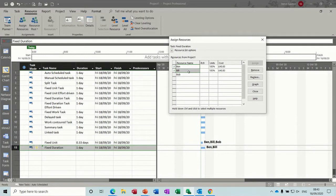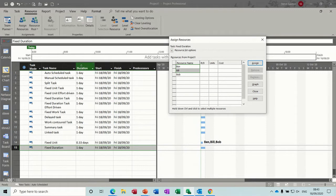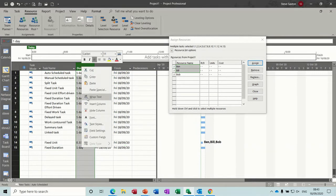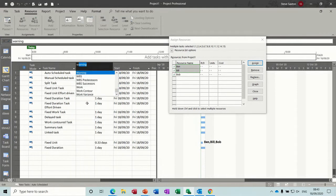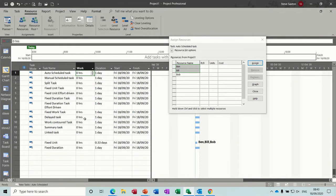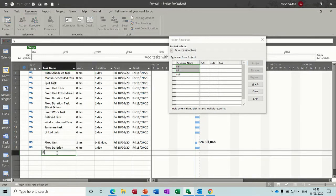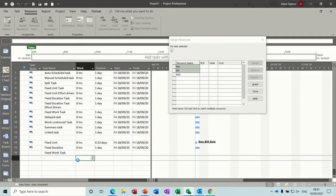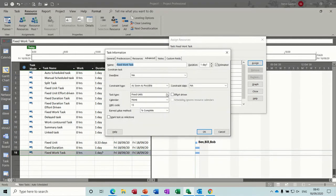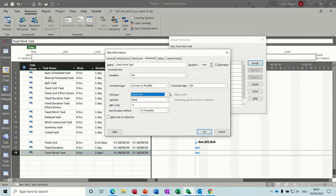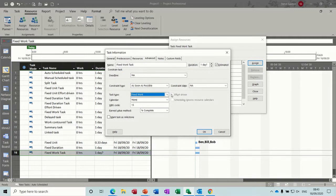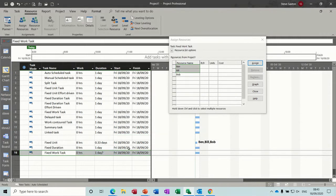Let's take these off there. Now the last one of this group is the fixed work, so to get the fixed work, I need to insert the work column, so just going to right click at the top there, insert work, type W, work. Now the next one is fixed work, and if I double click on that to set that one up, fixed work, the tick is on and I've got nothing, no control of that at all. So basically what's going to happen is if I add additional resources to this, it will try and drive down the duration, so you need to watch out for that. Click OK to that.